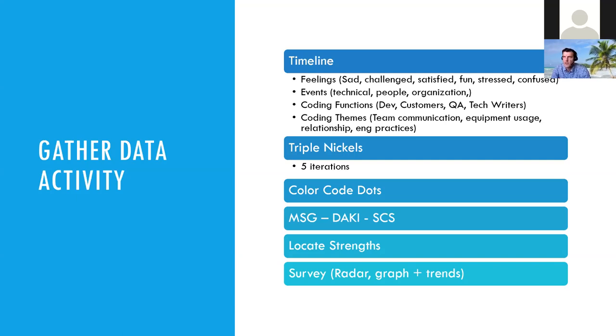If we order things in a timeline, it makes everything simpler to understand. And we can put many things on a timeline, not only technical things, but also feelings, events inside the team or outside the team, finding a correlation with meetings and so on, and stages of our software development life cycle, if we include the traditional things or the releases or whatever that is. So the timeline can be done through different aspects of the company. Like we can put also even our holiday calendar and so on. Everything was done in some portion of time, and putting those layers gives us a better view, and it will be very helpful in the future.